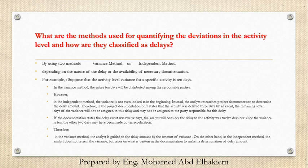If the documentation states the delay event was 12 days, the analyst will consider the delay to the activity was 12 days, but since the variance is 10, the other two days may have been made up via acceleration. Therefore, in the variance method, the analyst is guided to the delay amount by the amount of variance. On the other hand, in the independent method, the analyst does not review the variance but relies on what is written in the documentation to make its determination of delay amount.